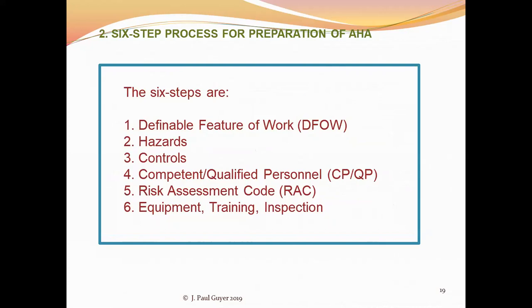Identifying the definable features of the work, and the project schedule is usually a pretty good starting point for this. We start the foundation work on this date, ended on this date. That is a defined feature of the work, the foundations.